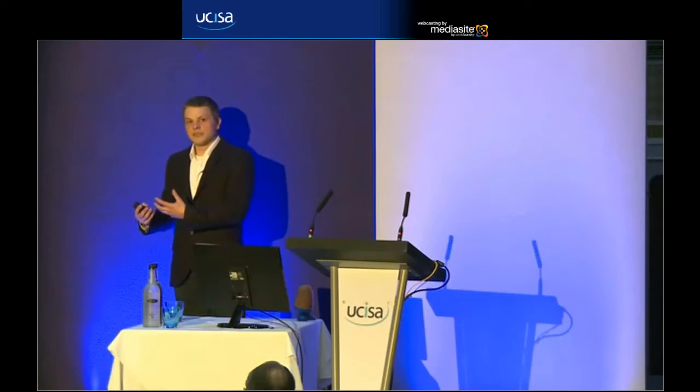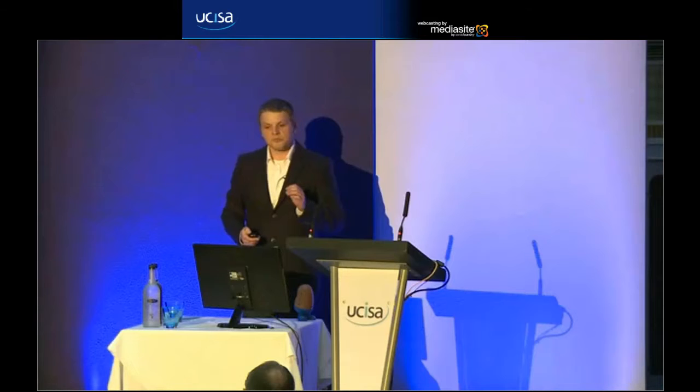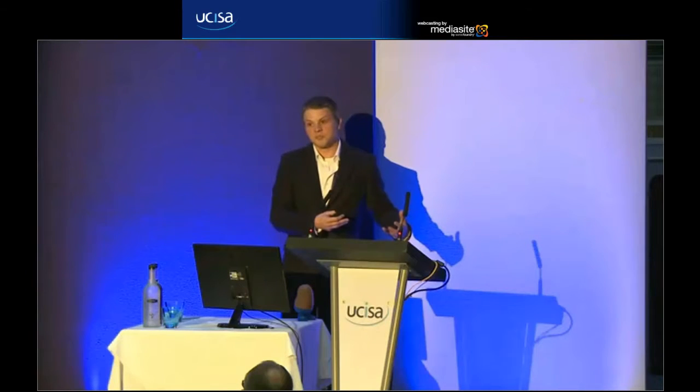So we've got our list of requirements, our Agile Stories, which are agreed with the customer, and everybody's agreed with them. We've taken those to our developers, the people who are actually going to do the work in the project. They've gone and looked at that and thought about how that's going to be delivered and given them relative sizes. We're now going to go back and decide on what the priority is with the customer. And this is quite important because the customer may change the priority once they understand how big something is.